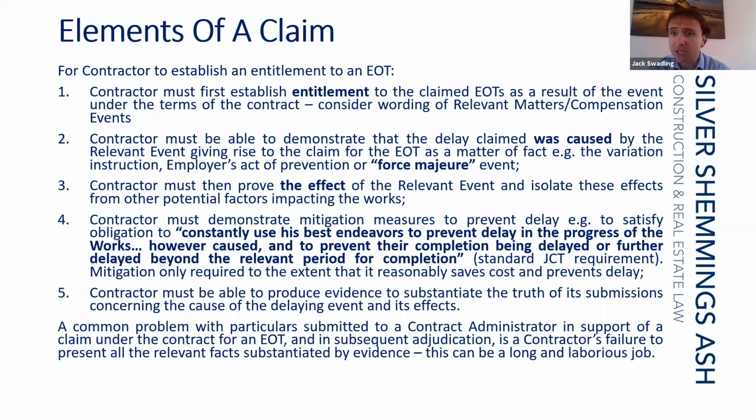It's interesting looking at Arcadis's recent global construction disputes report. The number one cause of disputes between contractors and employers that it highlights is unsubstantiated claims and misunderstanding on the part of contractors and employers about what the obligations are that are imposed by the contract. So it's vital for contractors to properly set out the facts in their particulars that they're submitting under the terms of the contract or otherwise in their referral to adjudication,